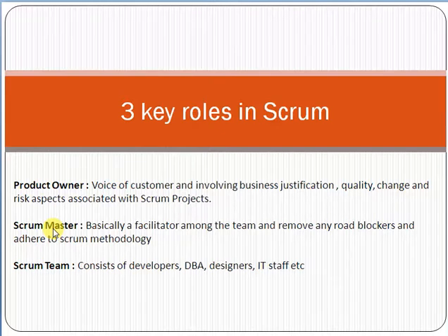For example, he will make sure that the daily Scrum meeting is held on a daily basis for about 10 to 15 minutes. He will make sure that the retrospective session is held. He will make sure that the team has good knowledge and understanding of the user stories. He will make sure that the Scrum methodologies and Scrum framework are implemented properly. He will make sure that if there are any impediments or roadblockers the team is facing, they are highlighted, and he is responsible for removing the roadblocker.